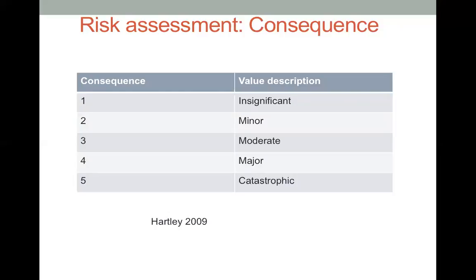And again, the level of consequence would be determined by the organization's risk attitude as well. Let's say for some organizations, losing $1,000 may be fine, but some other organizations may say, "Hang on a second, my business is small, so losing $1,000 is quite large for me. That's huge for me, so I can't ignore it. I need to address that."